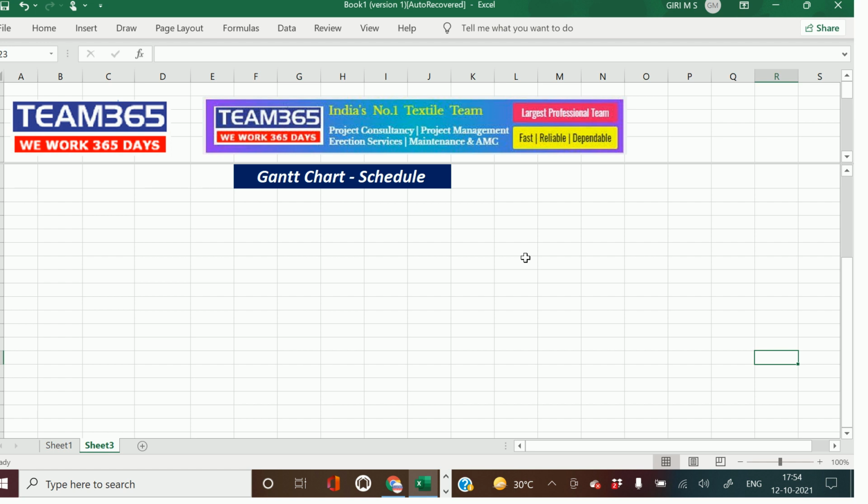So the targets and the duration are defined in a schedule, and we implement whatever has been scheduled and then use the schedule to monitor the implementation process, the erection process in case of erection, right? When to start, how many days it will take, and whether it is closing by the end date. Are we achieving our targets or is there any deviation? If there is a deviation, we can apply corrective action, right?